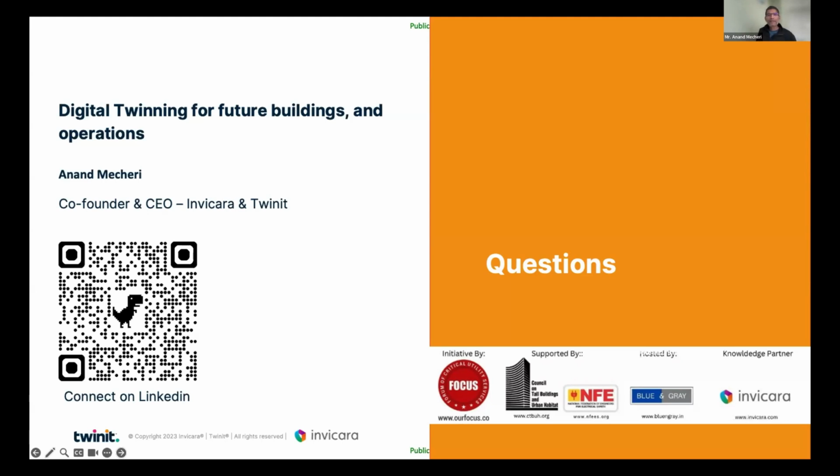Another question from Vinayak, which is, can we simulate and test systems in the digital twin? Yes, absolutely. So when you talked about domain modeling, you can incorporate within the domain modeling behaviors of each of those entities, performance specs around those. And then when you're actually testing the performance during commissioning, or even continuous commissioning, if you want to implement continuous commissioning, that's exactly how you do it. You define your performance requirements as behaviors in your domain model for those entities. And then you look at the real-time data and you find the anomalies, and then you use that to generate work orders for somebody to go back and do something about it.